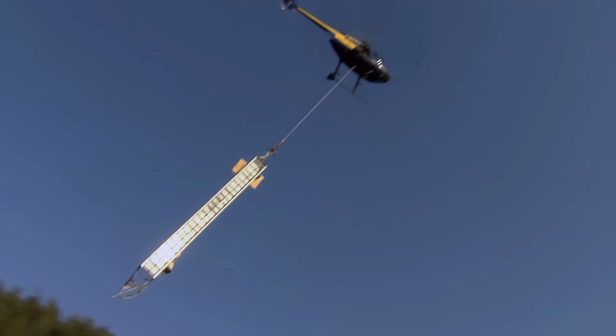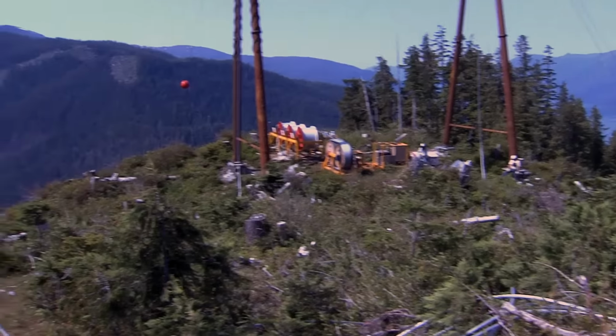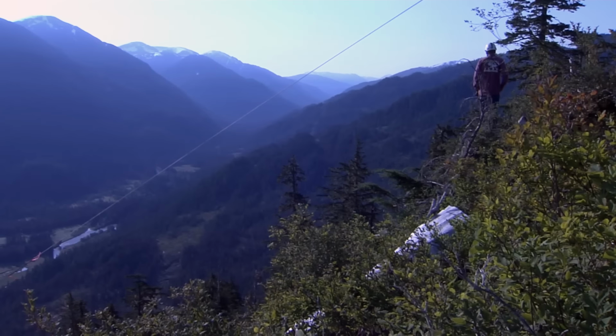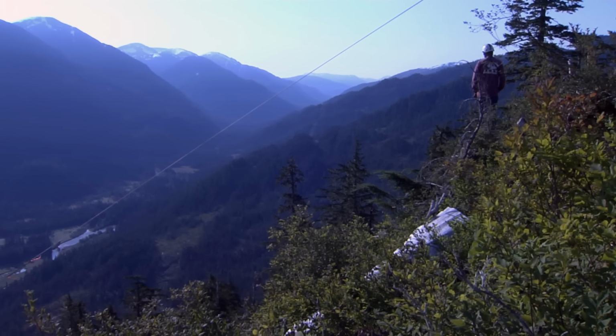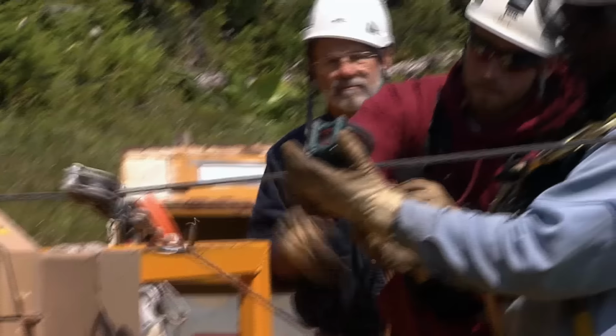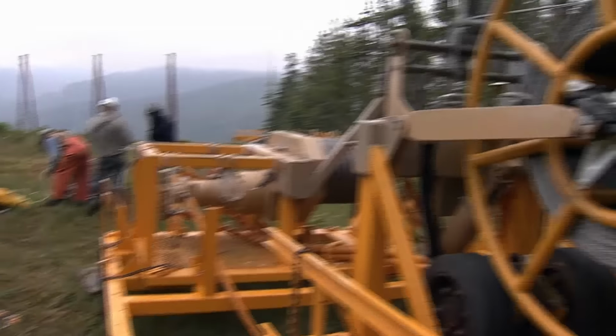That, plus in these long spans, the wire is 3 times heavier than what has been pulled so far. This Eagle River crossing span will be a near world record, total 6,890 feet, and it will be the one that tests the redesigned lightweight pullers to the max. You can't pull that with a normal helicopter with steel cable that's strong enough. The pull itself is 15,000 pounds of force just to pull the wire across.